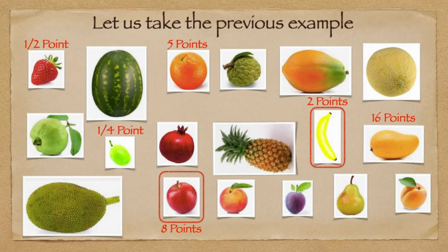So considering orange's complexity, uncertainty and volume of work involved with the first reference banana, the developers realize it is definitely bigger than banana. Then they go with the apple comparison. Is orange bigger than apple considering the complexity, uncertainty and volume of work involved? And they realize no. That means the orange size is ranging from 2 points to 8 story points, but towards the higher side. So maybe 5 points. Like that you can give the story point for all the rest of the remaining fruits.